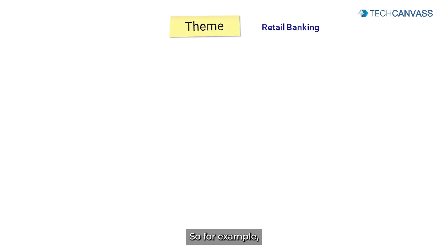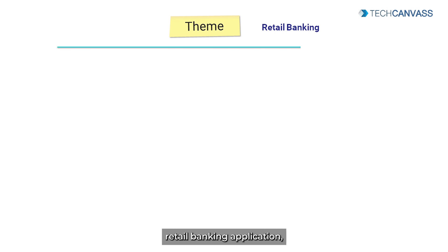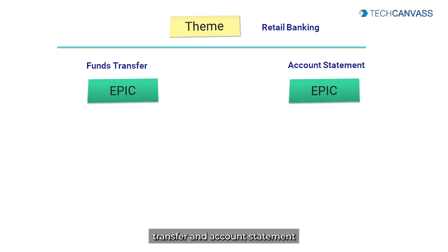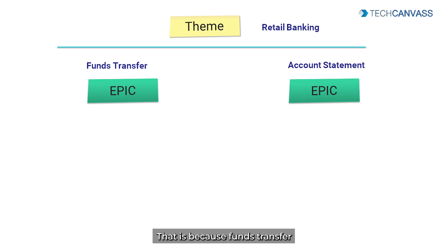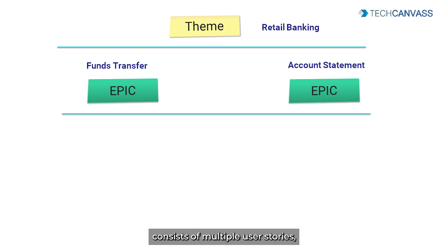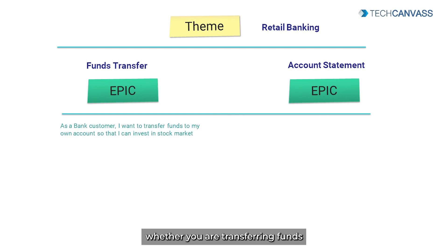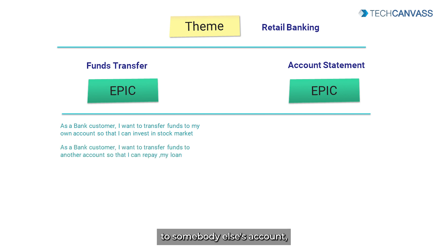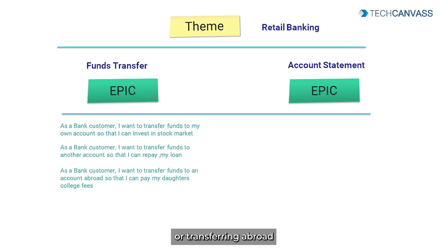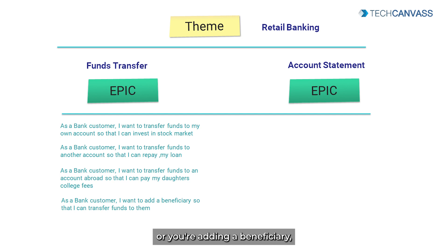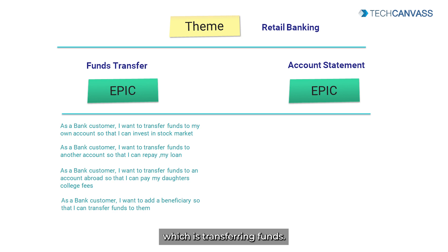For example, in a retail banking application, funds transfer and account statement represent epics. Funds transfer as an epic consists of multiple user stories — whether you are transferring funds to your own account, to somebody else's account, transferring abroad, or adding a beneficiary — they all share the same objective of transferring funds.